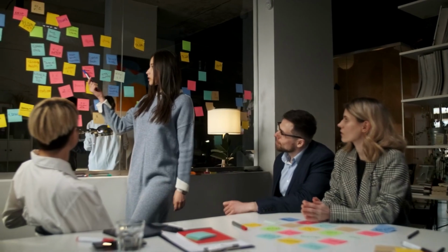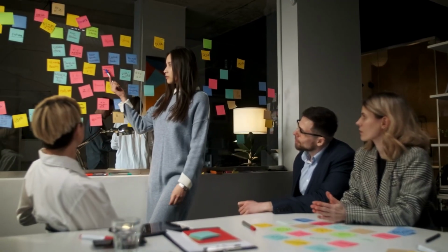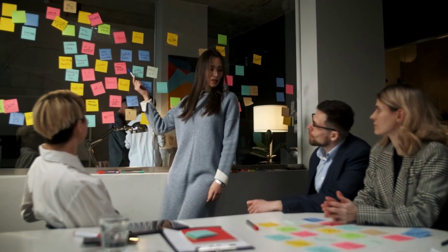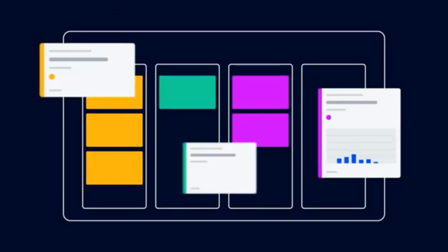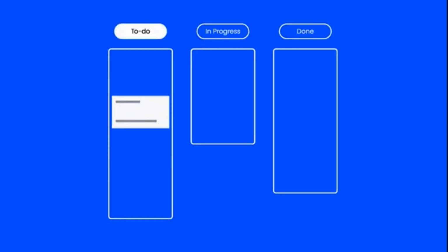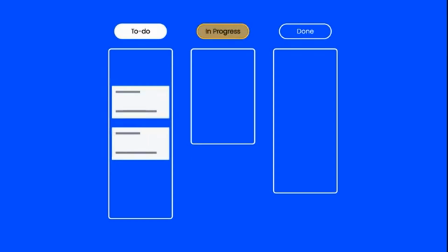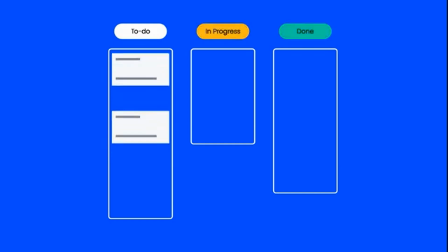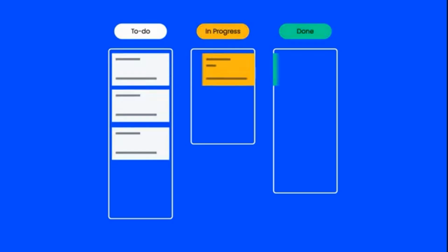Many of these Agile methodologies will either have each individual task written on a post-it note on a wall or board, or in a similar digital form on a website. These tasks can then be organized into different categories of things that are required, nice to have, or cut from production to help keep the project focused on its objective. While completing each individual task, the note or card is either physically taken by the developer completing the task, or moved to a separate section of the board to indicate that it is currently being worked on.